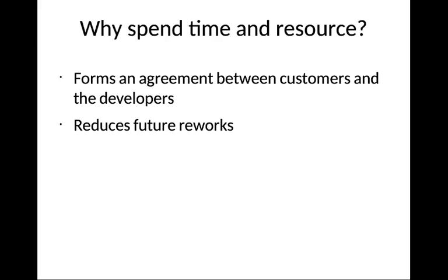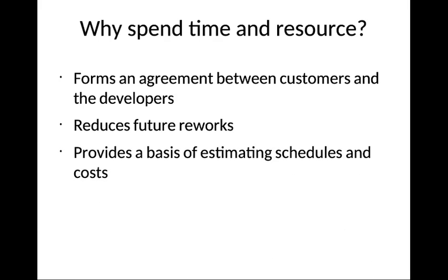Then we can reduce future reworks. If we prepare a proper SRS, then there won't be any changes in the later stages. Otherwise what happens is, the customer will mention some other requirements in the later stage, and we have to add these requirements, and we have to redesign, recode, and retest. Everything should be done again. So in order to avoid those things, we have to spend much time to prepare this SRS without any errors. Then it also provides a basis for estimating cost and schedules. So already we have seen that.